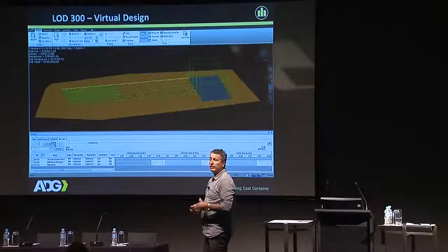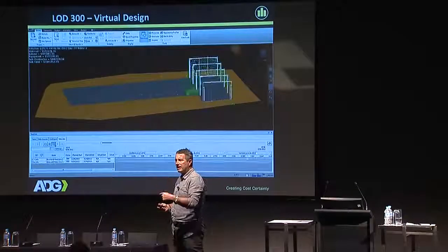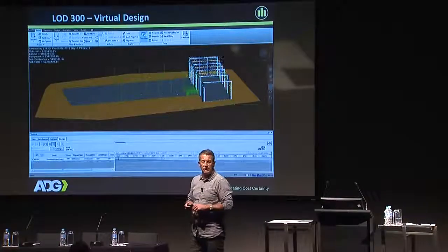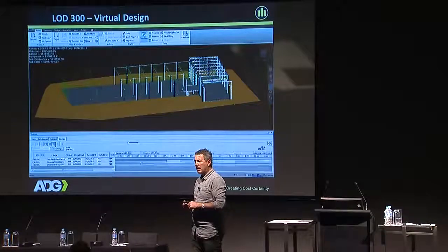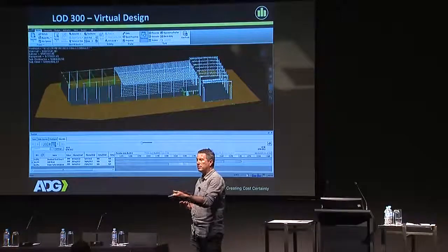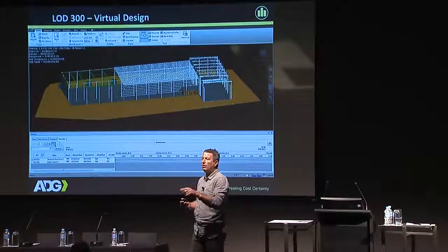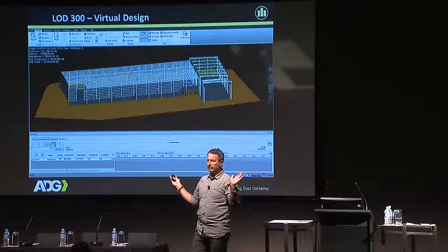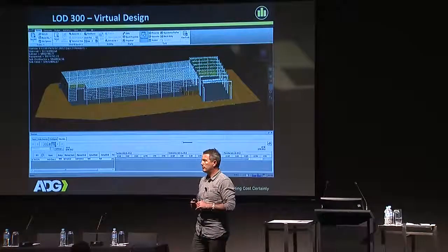And myself, I'm not really sure of the value of that, but something that I did learn is how powerful it is to understand the quantity of work within each activity. And these are things that we see on sites. I'm in the midst of a dispute at the moment, between a builder and a petition subcontractor, which is all about the contractor saying, I want you to have 65 men on site, and the petition guy saying, if I have 65 men on site, 20 of them will be sitting on my ass and you're forcing me to incur more costs.